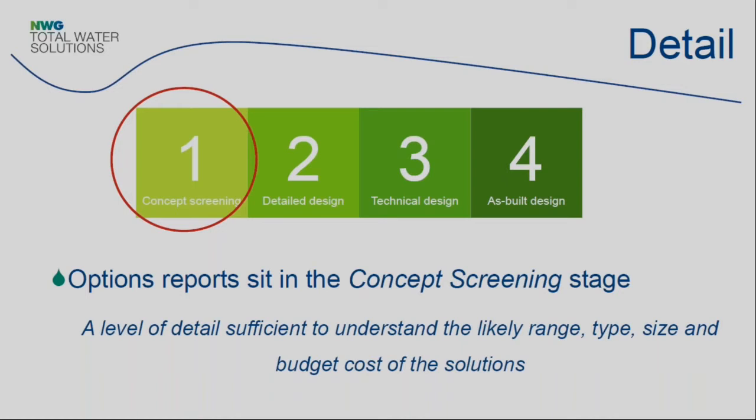So concept screening sits very firmly in the first stage of that. And this is what drives all of the other stages of the program. And you would hope by the time you get to stage 4, or even by the time you get to stage 2, you've identified what the most appropriate options are. So you don't get to stage 4 and then realise actually there was a better option which you could have done several months earlier.